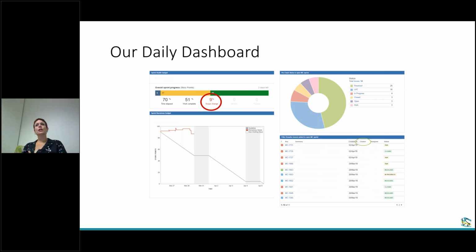So it's a drill down into the dynamics that are happening in the burn down chart to the left. On the right, you can see that we have things, which is even a further drill down into what status in Jira these things are in. So it's more information about, okay, do we have tons of stuff in QA? Do we have tons of stuff that's in dev? What's happening? So we know where to focus our efforts. Again, you want to stop starting and start finishing.